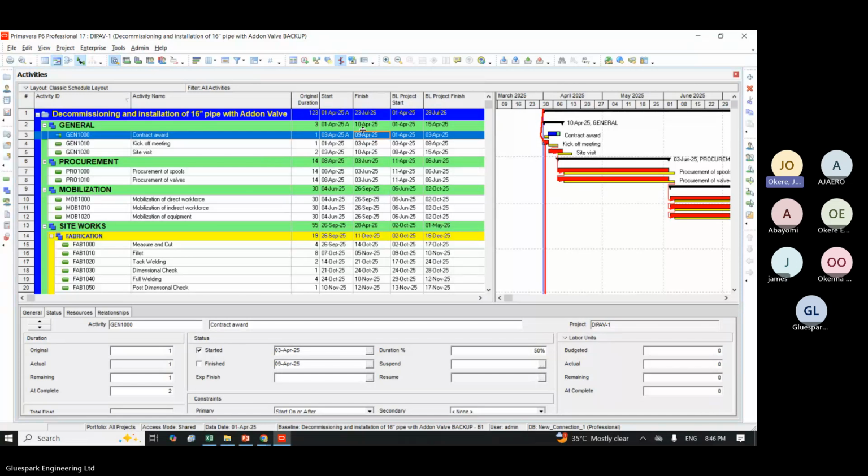You understand? So you're able to interpret this, that baseline is how you have planned it. And there is a deviation, right? If you started earlier, your baseline will also indicate when you planned to start. And your actual, which is your start date, will tell you when you started. And you also see your focus, which is telling you when you will likely finish. Okay? So I don't know if there's any question here. This is just a little secondary aspect. I just chipped in this so that we'll all have a little balance on what baseline is doing.